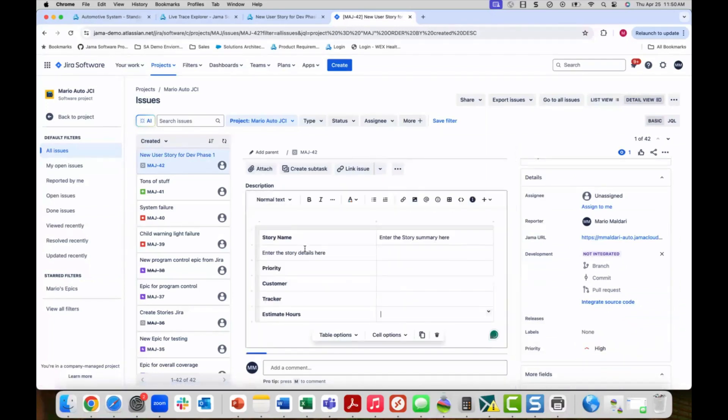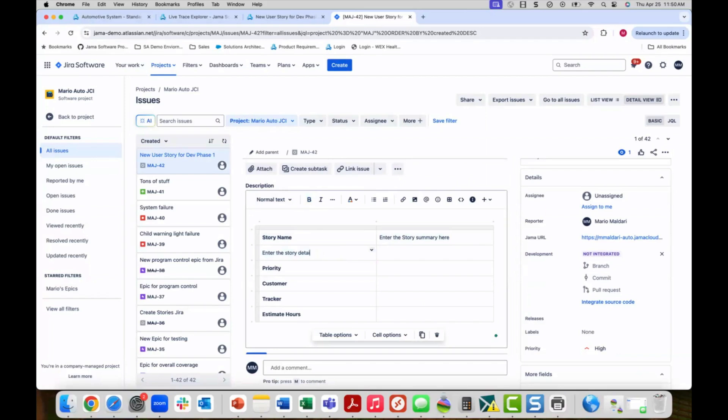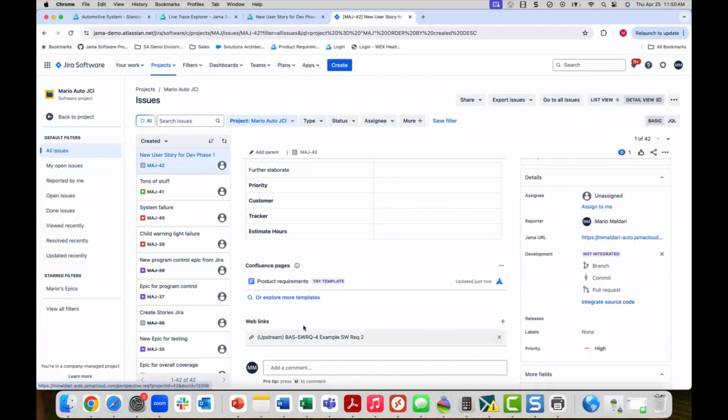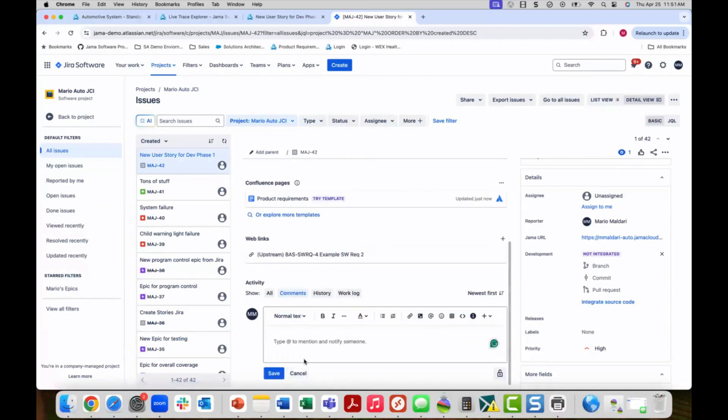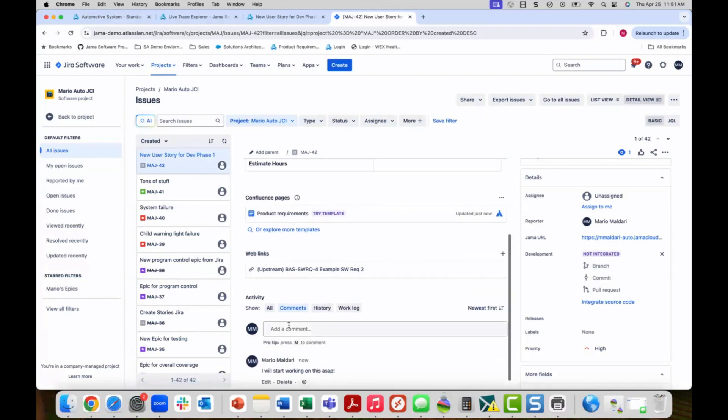You can modify the fields in the description, fields in the name, and they can even add a comment. All of this work is done in Jira, but the changes are reflected over in Jama. This allows for Jama to maintain the current state of the project while the work is being performed in Jira.